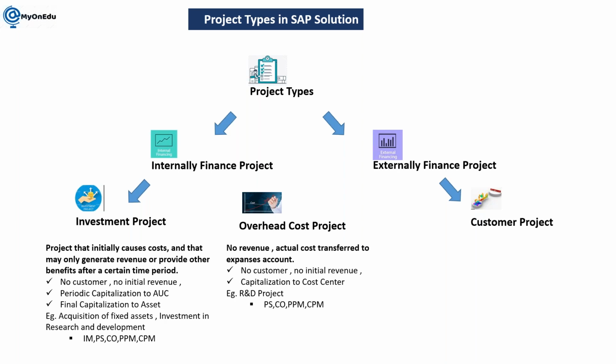To manage all these maintenance activities, we go with the project system integration, where you can create a project and then create individual activities for the maintenance, and these activities will be assigned to a particular maintenance order. Whatever cost is incurred in the maintenance order has to be settled into the project, and further it will go for analysis. So that is one more business case here.